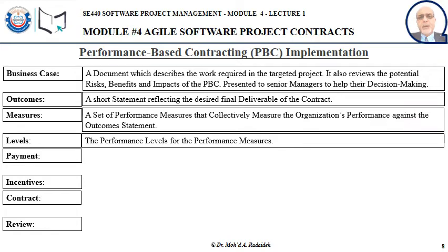So basically we have 3 levels. However, the beyond or higher level, we may classify into sub-levels as well. We say, okay, they are 10% better than what we asked for, or 50% better, etc. With the lower level, we may indicate in the contract that if they come up with something like 80% of what we asked for, then we won't pay them more than 80% of the payment value.